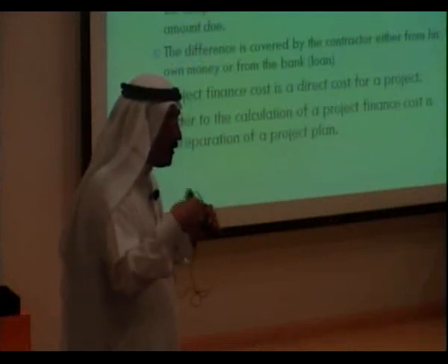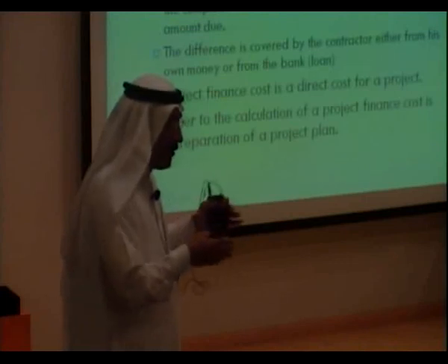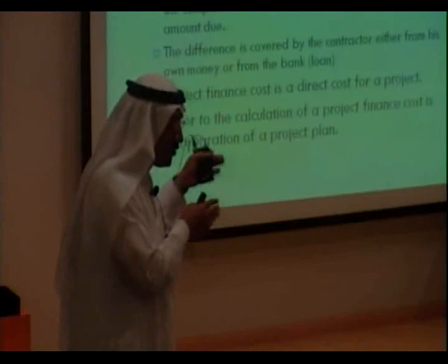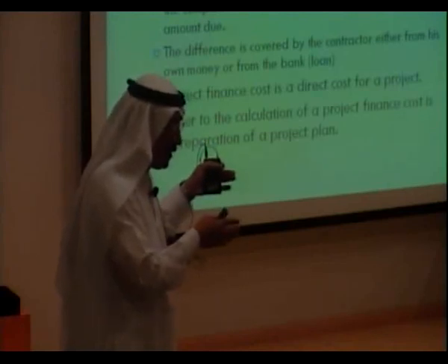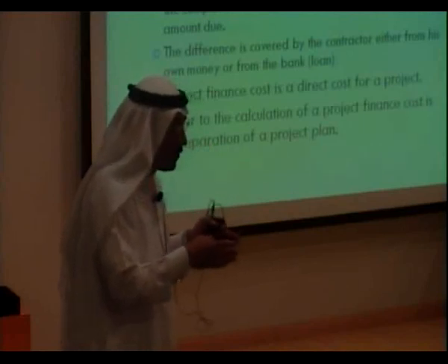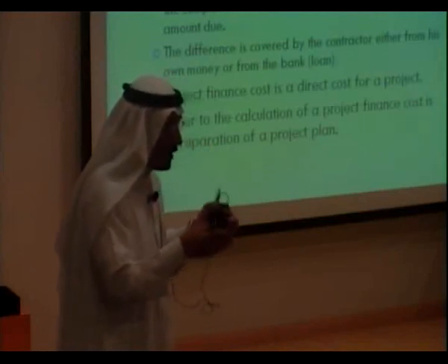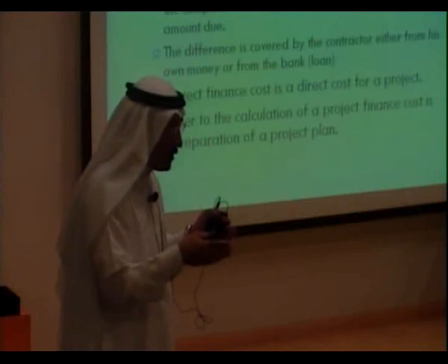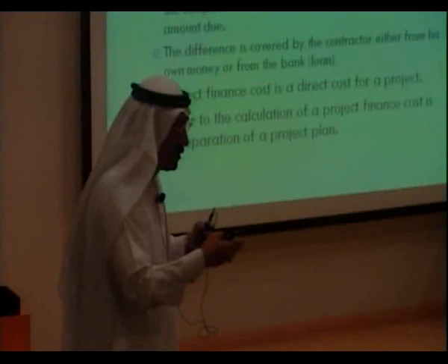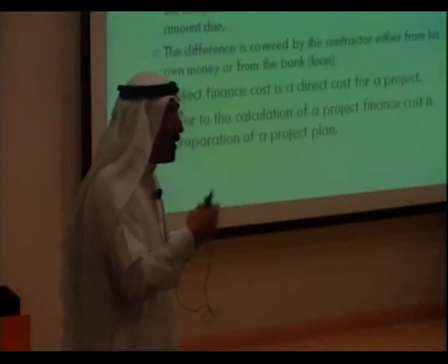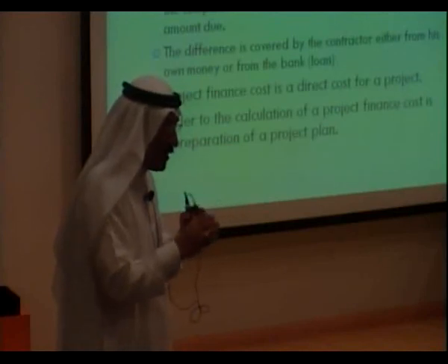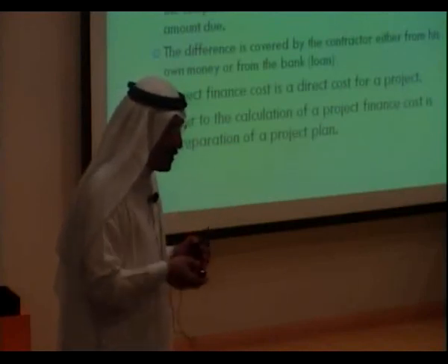And the way it is done in the construction industry, maybe over here in the government you are paid like 20% at the front and you don't need a lot of finance, right? So this kind of finance is not there. But if there are projects where you are not going to get any money at the front, you will be paid like 1 month after you start. And when you are paid, you are not paid the total value. There is some kind of retention. They will retain a certain amount, 5-10%.